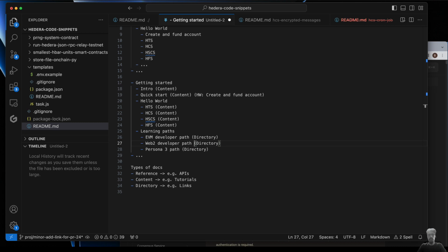Okay, continuing on, the next thing to do here is to plan all of the tasks. Roughly the process that I'm going to follow is to identify tasks, then split tasks between teams, specifically in this case the DevRel team and the docs team. So there are roles and responsibilities. You could do a RACI matrix if you want a more complex stakeholder structure, and that's maybe for later stages to be determined. But for now there are just two parties responsible, the DevRel team and the docs team, and we'll keep it simple that way.